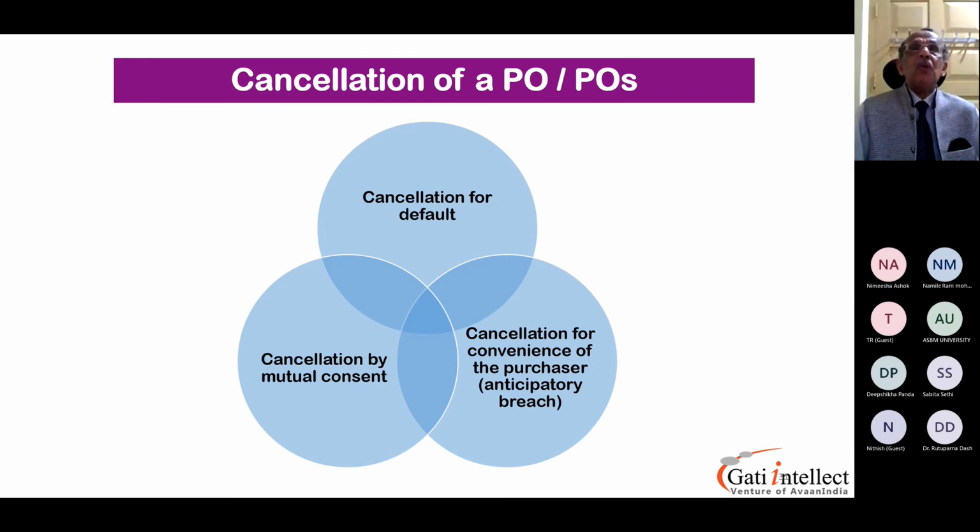So even though you have made a mention in the contract that only 2 is permitted, with proper reasons, if you keep on accepting the lead time excuses, it becomes a precedence. So please don't do that. That's what the court says. Is it clear? Yes, sir. Right. Thank you. Now let's see the other one.